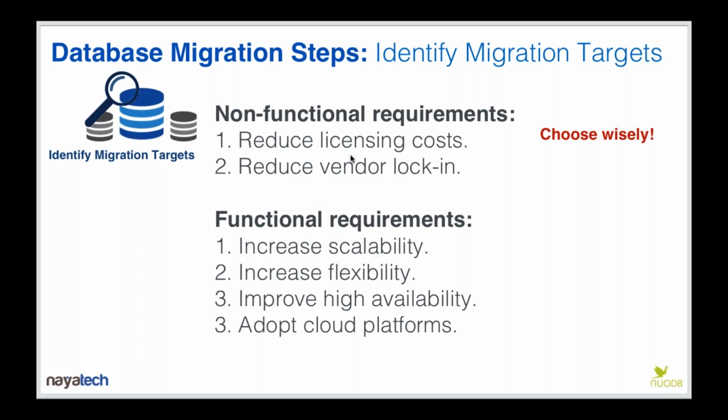And if you're approaching a database migration project coming from these non-functional requirements, it's very important to choose wisely when you identify the databases you want to migrate. By that I mean that if you don't have a specific database that you want to switch to another platform because you need better scale or better high availability or move to the cloud, but you are looking from a business angle to reduce licensing cost or reduce vendor locking, then it's very, very important to choose, at least for the first wave of migrations, the least complex databases. And we'll see what that means in a moment, because no two databases are identical. They are snowflakes.